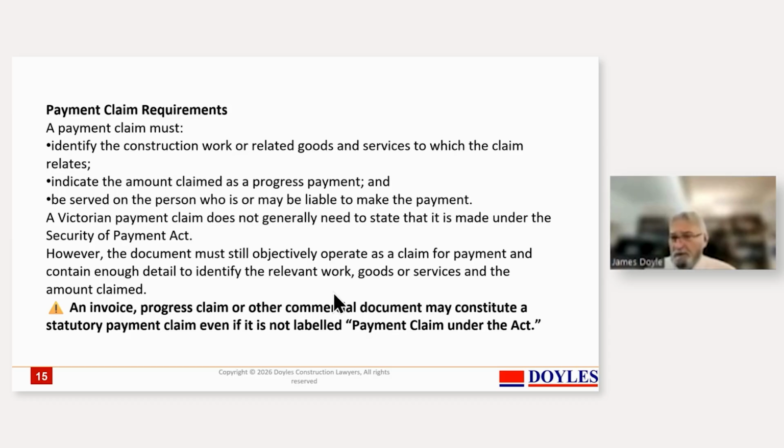It goes back to when you set the contract up. We've got to think through what sort of claims are going to be made under it. And you want to have the items identified with their value broken down in some sort of bill of costs, so that you can say, well, I want to claim for the concrete, I want to claim for the underlay of the concrete, and I want to claim for the layer of anti-evaporation I put on top of it.